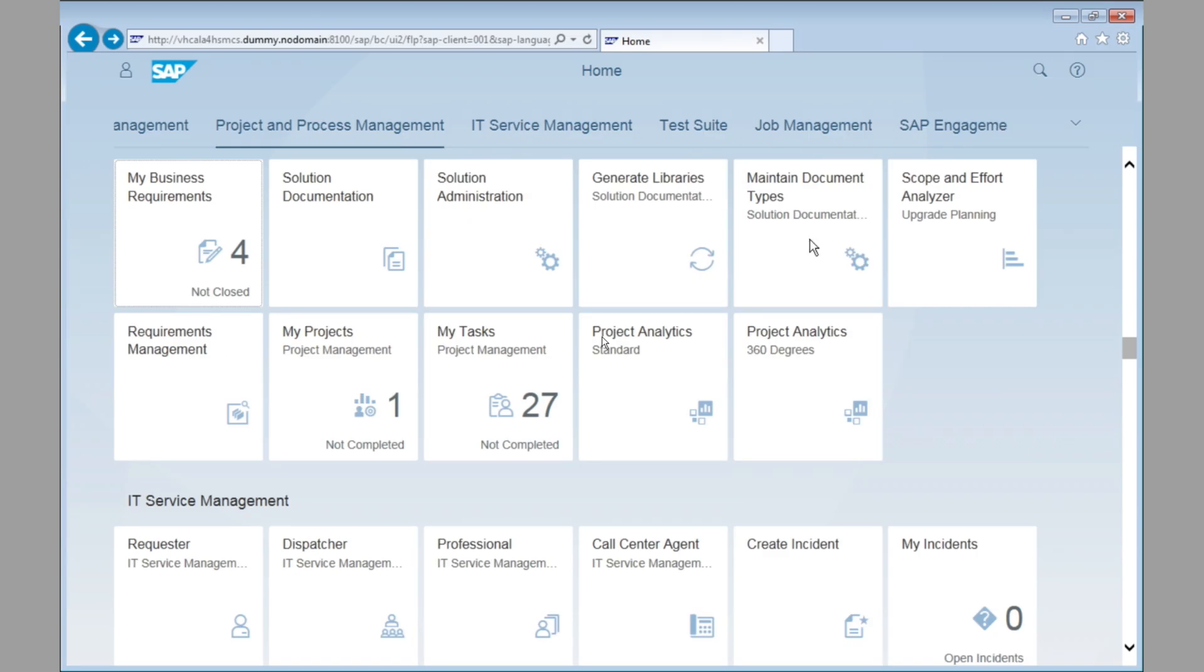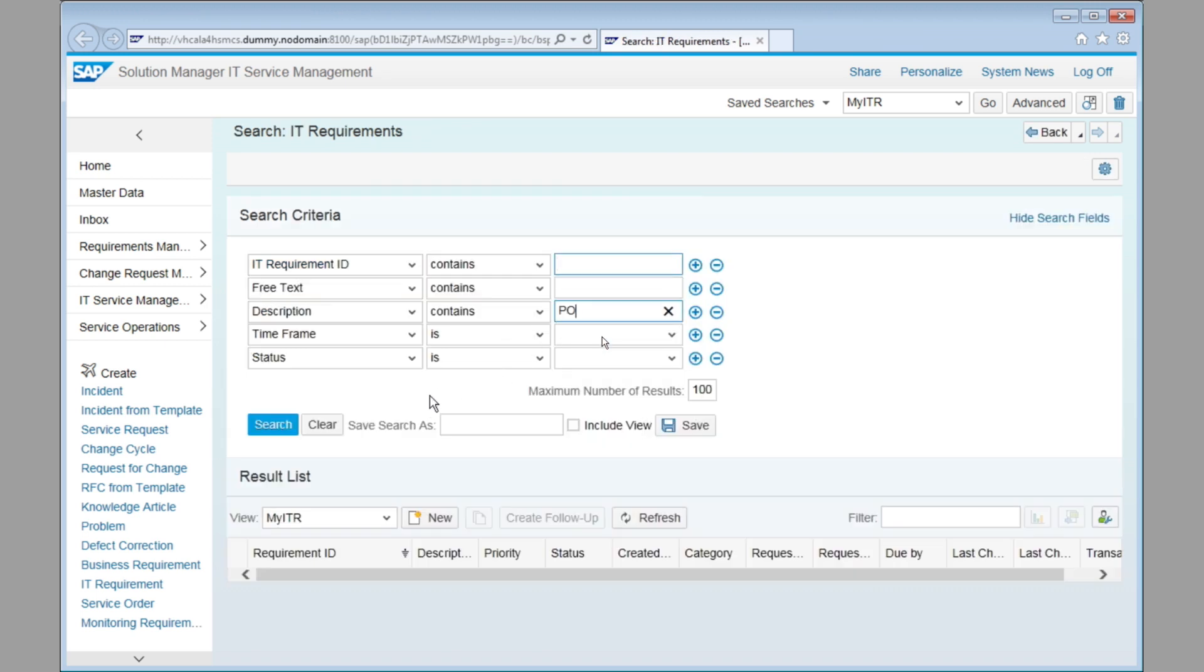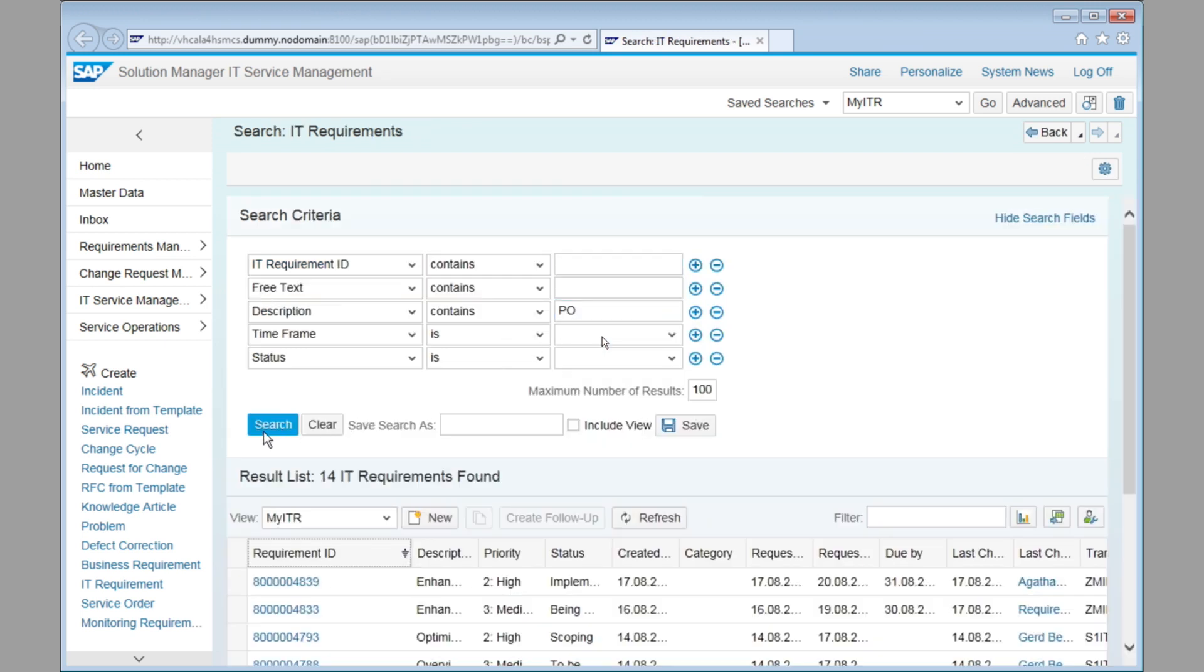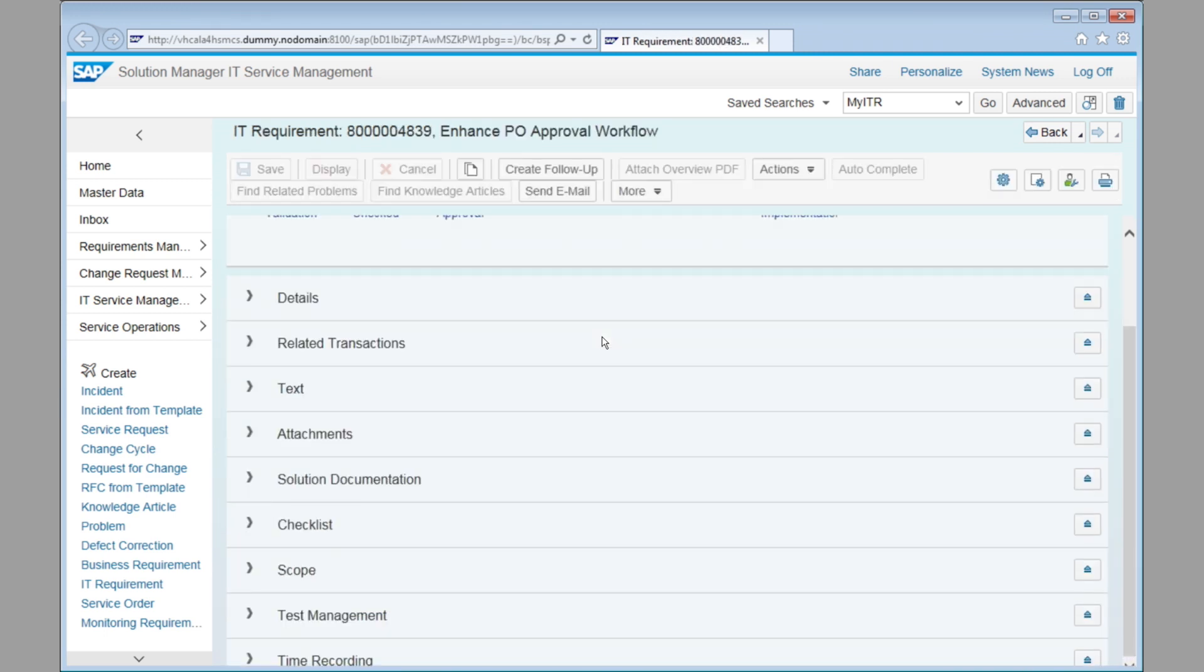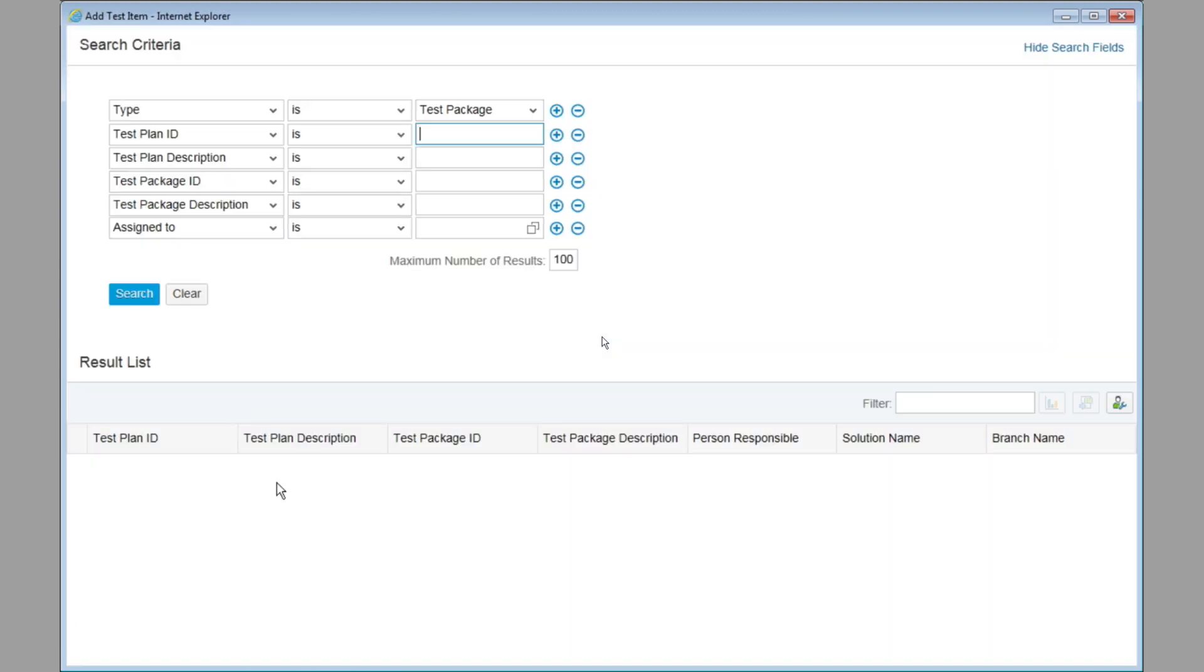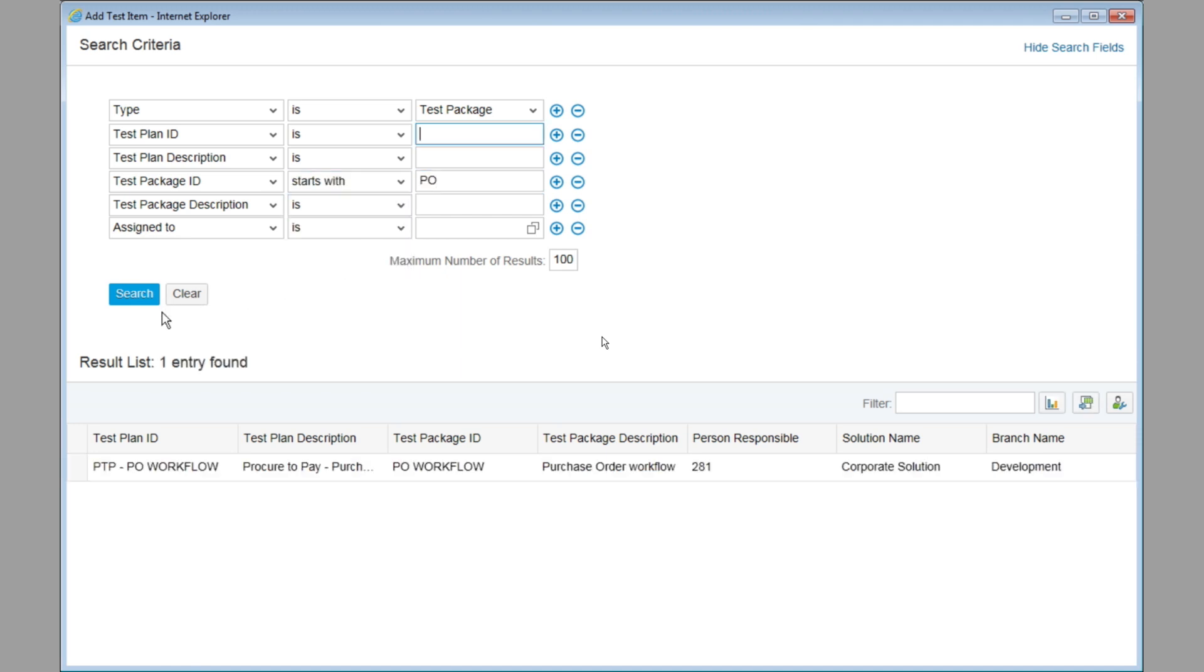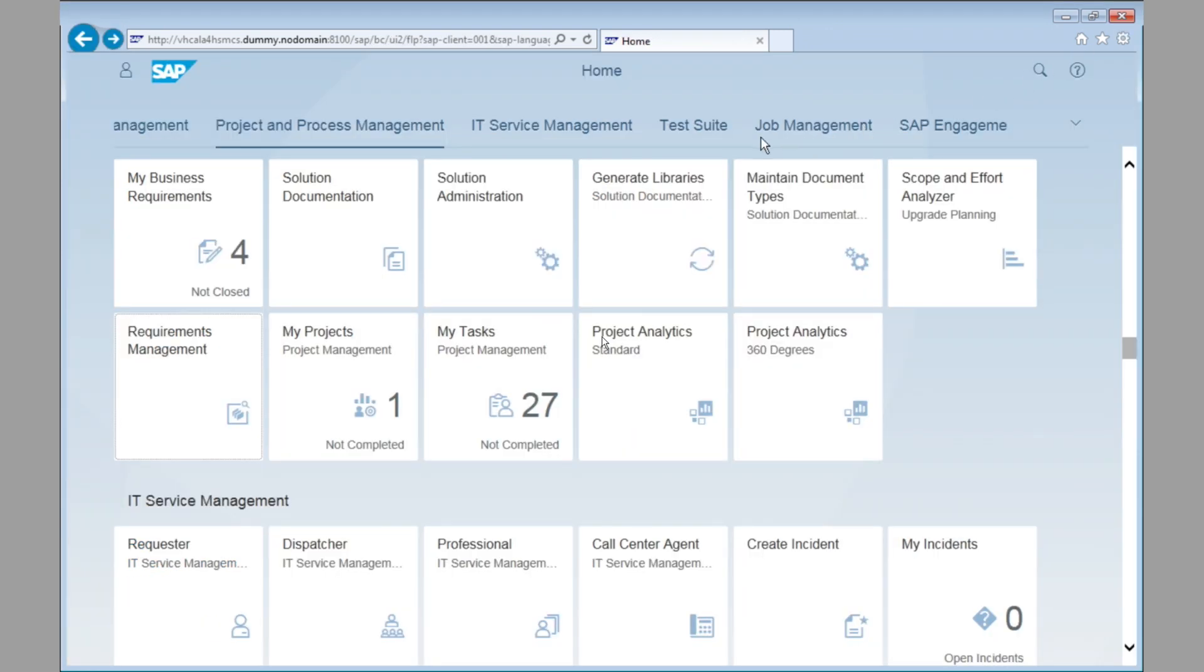Coming back, going to the next steps, you see that in your requirements, the one that we had previously created, we have additional information now. Scroll down to the very bottom. So here, we can now say, how is this requirement tested? And we would now add the test plan that we had created before, and assign it to the IT requirement for end-to-end traceability. And we save and continue to the next step.